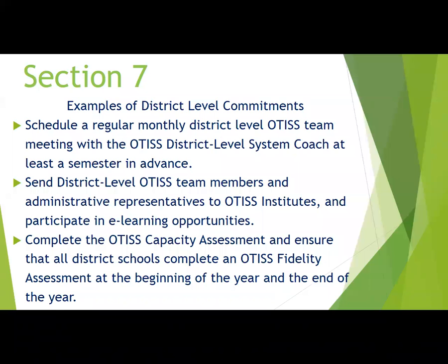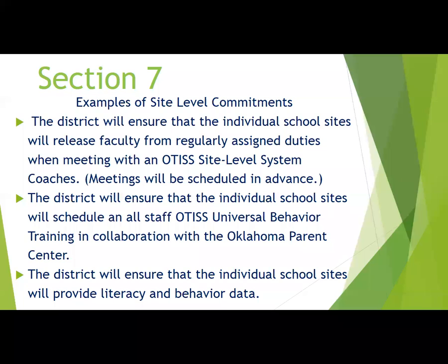Those are the types of commitments that we're asking to be signed off on for the district level. And then at the site level, districts will ensure, and these are just, again, a few of them, that the individual school sites will release faculty from regularly assigned duties when meeting with OTISS site level systems coaches. And again, meetings will be scheduled in advance, and the lesson that we learned last year is we do schedule meetings now a semester in advance instead of a month in advance, and we find that that has been much more successful.